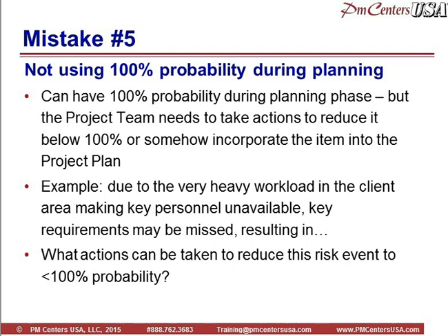I did a project. This was a custom-built software project. And it impacted plants for this company around the world: Australia, China, England, France, U.S., Brazil, Canada. I mean, it impacted all their sites. And quite frankly, the company was extremely busy. And key personnel at the different sites were not available to talk to get requirements. So when we did our risk management, when we did the initial plan, I put in there that we had 100% probability of having incomplete requirements.